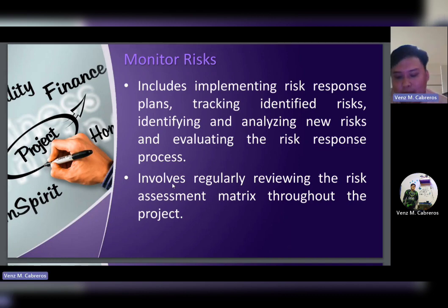So usually, what are the ways to monitor risk? First, one starts with the processes, assess the effectiveness of the processes, update the risk register, conduct reviews regularly and schedule meetings. Check the stakeholders are still comfortable with the risk profile. Be mindful of the budget and consider an external audit and risk register.